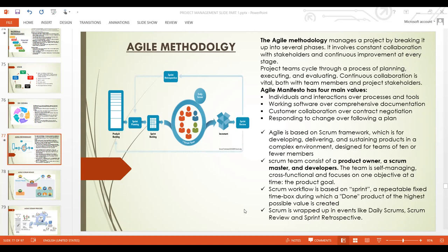Then you move to Scrum Demo. You call it Scrum Demo or Scrum Review, whichever one you call it, the two are accepted in Scrum. Scrum Review is when after 1 month, you have developed a piece of software. Then you invite the stakeholders and show them what you've done. You show the stakeholders how the feature is working. Somebody outside the team will actually come and use the feature to see how it's working. And once everybody's seen that it's working, then that feature can be deployed to the main product.